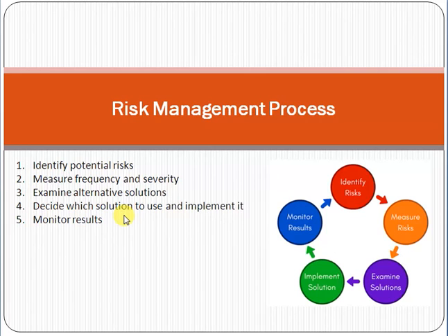First of all you have to identify the particular risk in an Excel sheet, then see the probability, the likelihood or chances of occurrence. Then identify the impact on the project. Just make all those columns in the Excel sheet. Then see whether it is necessary to go for the same technology, or you can go for another technology in which the team is capable, and take the appropriate decision after discussion with the technical leads and your senior management.